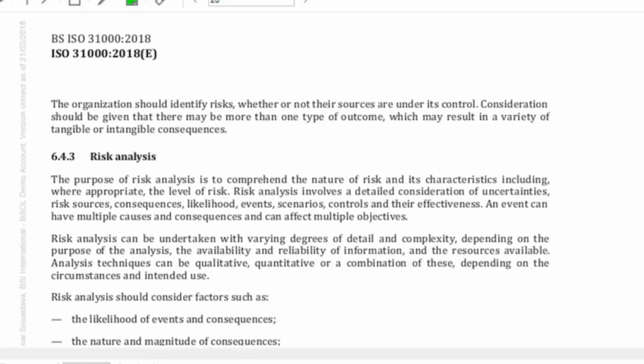So involve all those people who are from that particular function or activity in reviewing the risk at least once in a quarter. And if it is a high risk area, every month. And if it is an engagement, then maybe every month you'll generate a report. So it all depends on the criticality of the event, the criticality of the function, and the criticality of the data for which you are identifying or reviewing the risk. So have you all understood the risk identification process? Remember the four things: risk source which has given rise to an event, then the consequences and the likelihood.